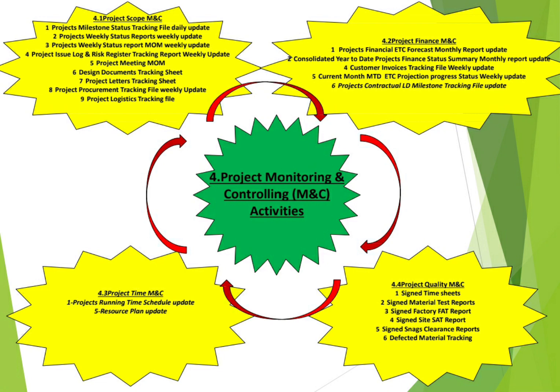There will also be the project's weekly status report minutes of meetings. Once you discuss this weekly status report, the project control team with the project management team, and they agree on some action items, there should be minutes of meeting done and shared with this weekly status report.